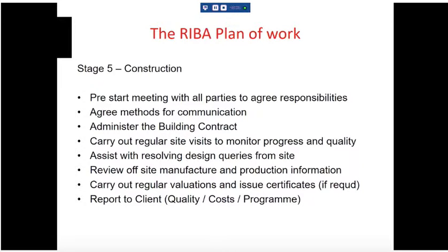But somebody has to administer a building contract in a fair and reasonable manner, agree that monies can be paid each month, etc. Someone will be doing regular site inspections to monitor progress and quality, and dealing with any queries. There might be off-site manufacture. If you've got some fancy panels that are all going to get here, or it's all clad in ceramic material, then maybe you're going to have to visit things off-site and see how they're coming along. There will need to be regular evaluations, because the contractor can't just get paid at the end. They want paying as they go along, even on a little job, particularly on a little job actually.